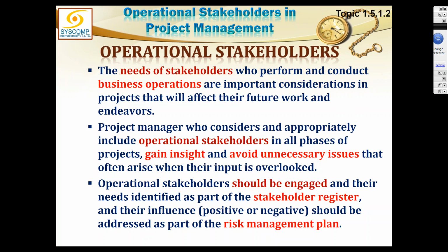Operational stakeholders should be engaged and their needs identified as part of the stakeholder register. When do we create a stakeholder register? When we are identifying project stakeholders. So do include some of the operational stakeholders in your project, in your stakeholder register, and note down their influence, whether they are positive or negative or whatever, and also consider their input into your risk management plan.